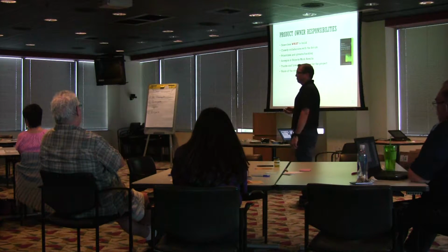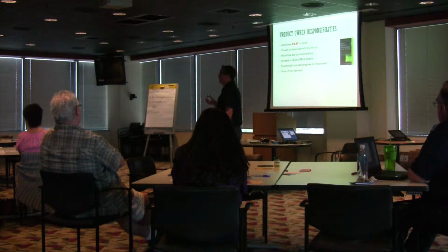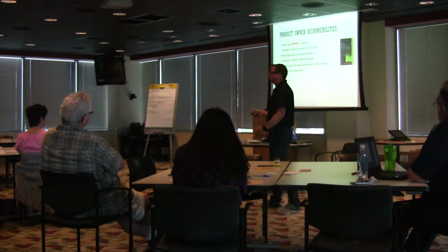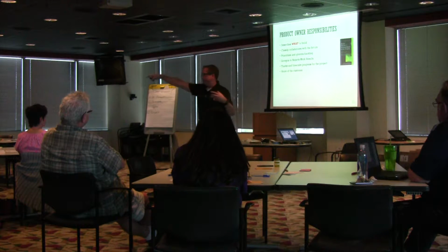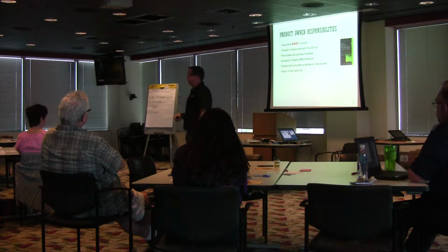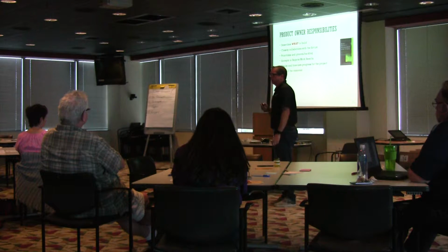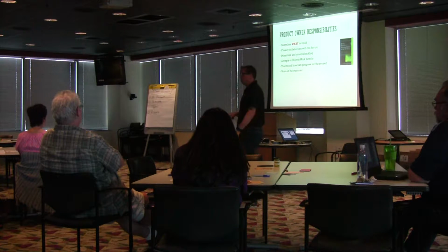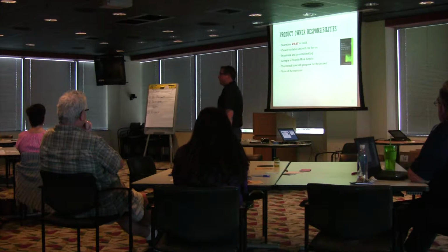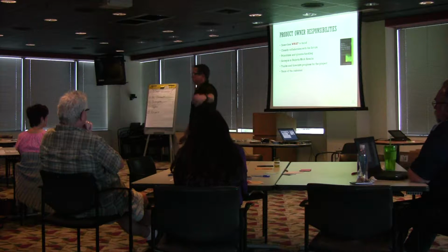Are they defined anywhere within the business? I think it happens organically. Product owners oftentimes will do a stakeholder map, kind of like a mind map type of thing, and say, here's this product touches this group, oh, this group touches this group. So that helps you identify all the stakeholders. Is that perfect? Probably not. So probably room for improvement, but that's the way you might approach identifying it. But it's not like this product you're assigned to these 10 stakeholders, or vice versa.